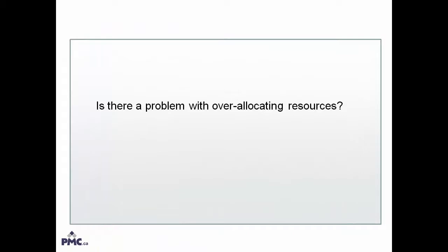Is there a problem with overallocating resources? Well, there could be. At times, when we need our project teams to roll up their sleeves and get us out of a jam, asking them to put a little overtime in is not unheard of. Doing so for short periods of time is bearable, but doing so over long stretches of time will not be. Projects and organizations will suffer if they operate in such a manner. People will simply burn out. And if they lack job satisfaction, they will seek other opportunities, especially if there's no sense of accomplishment, improvements, and/or change in the status quo.